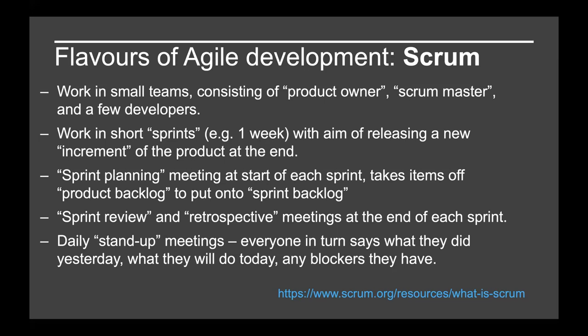And similarly, at the end of each sprint, you have a sprint review where you talk about what you've done, and how you think this new iteration of your product is useful, and then you also have a retrospective where you examine how the actual working went, what bits went well. Maybe you overestimated the time it would take for this thing. Maybe you underestimated it. Were there any ways that the team didn't work well together, perhaps? And that's a crucial point to make sure that the next sprint is more successful than the previous one at every point.